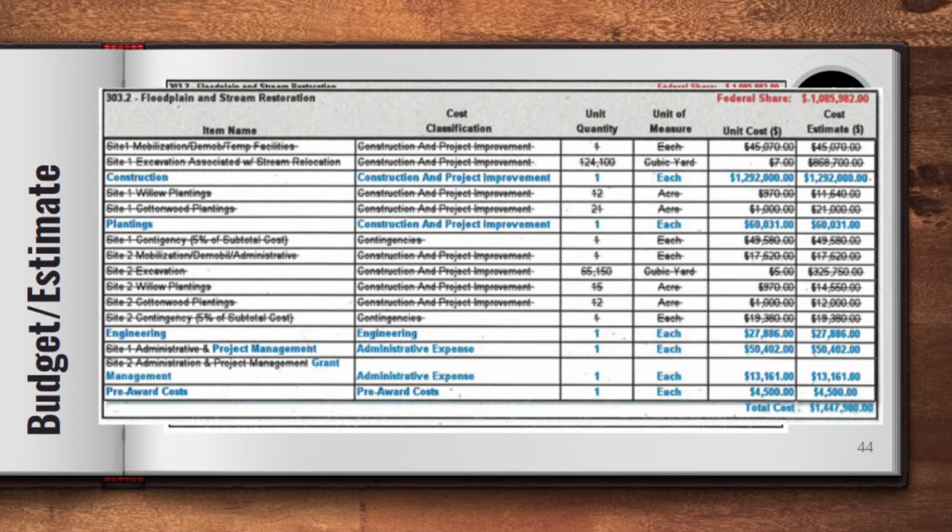But when you're entering those line items into e-grants, you only want those 5, because what's in that e-grant line item is the category I reimburse you on. And you can even say in the narrative, because you have to write a little paragraph about your budget and how you figured it out: we got some bids, or we've done these projects before, so we know generally how much it costs, or we're using in-house materials. You can put in there that you estimated it will cost about this, because oftentimes you don't know. You have to get a contractor later, or you don't know until you actually do it. But your grant is going to be awarded on your estimate.